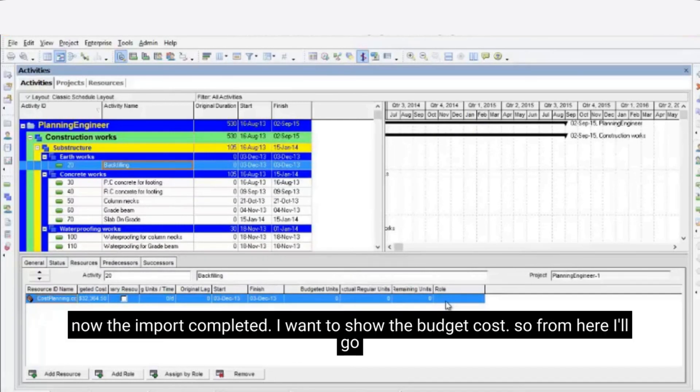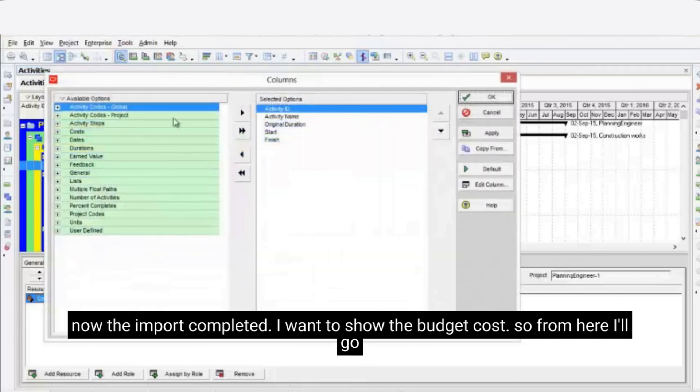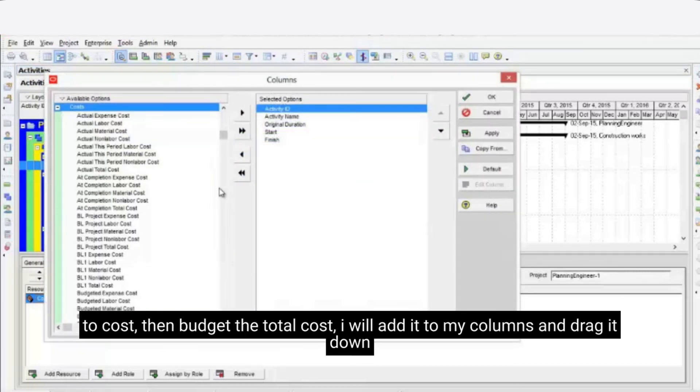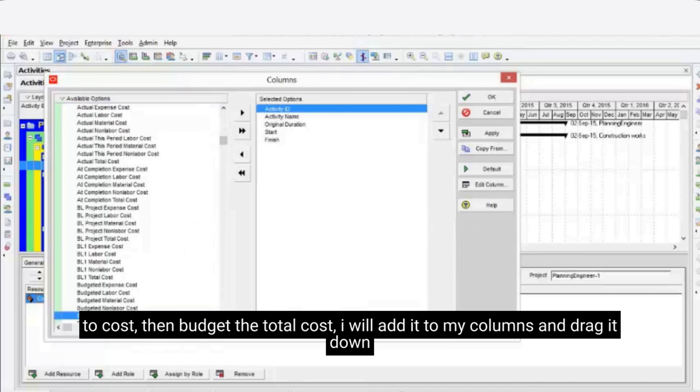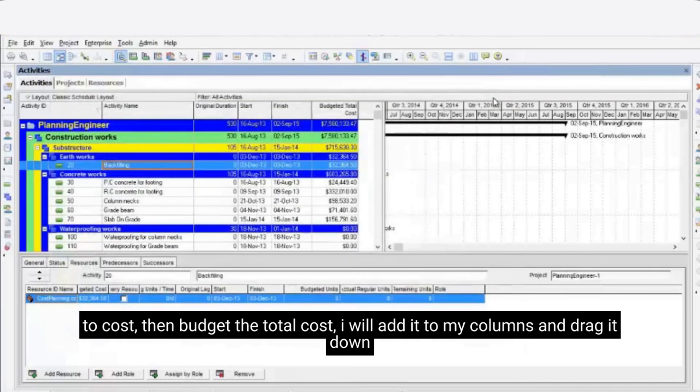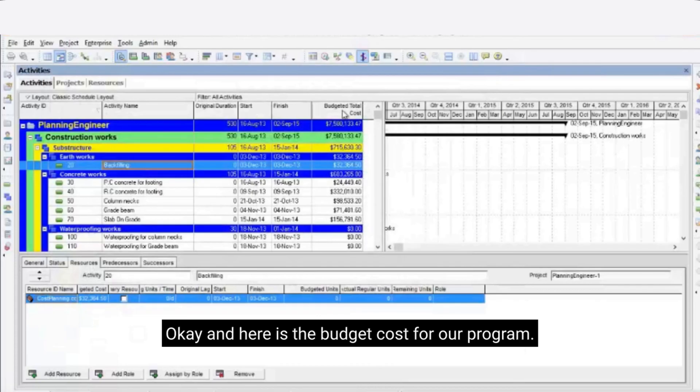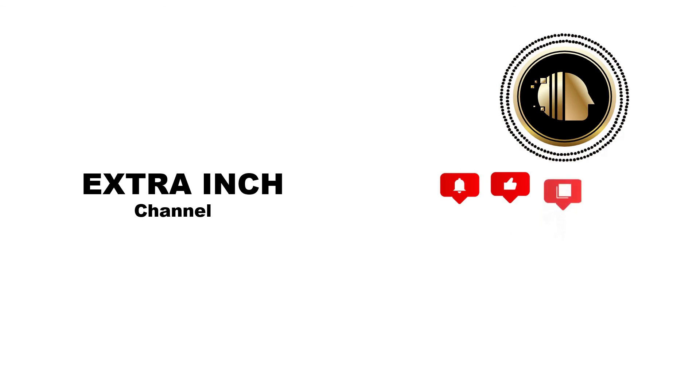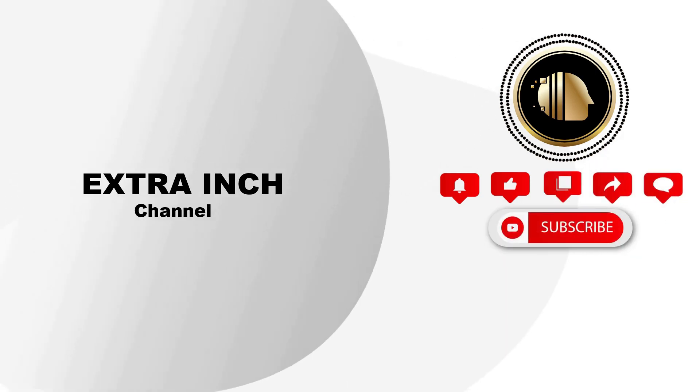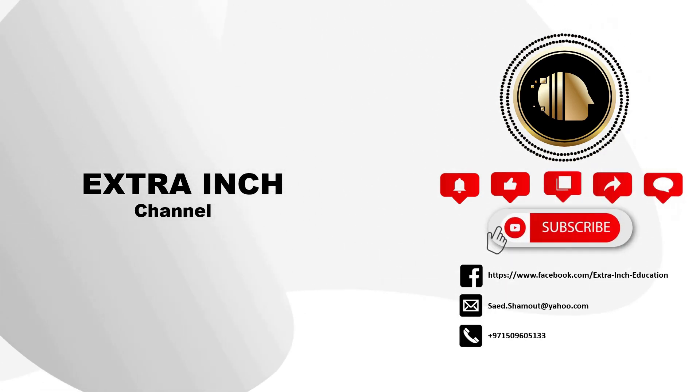I want to show the budget cost. So from columns tab I'll go to cost. Then budget. Then I will choose total cost. I will add it to my columns and drag it down. And here is the budget cost for our program.